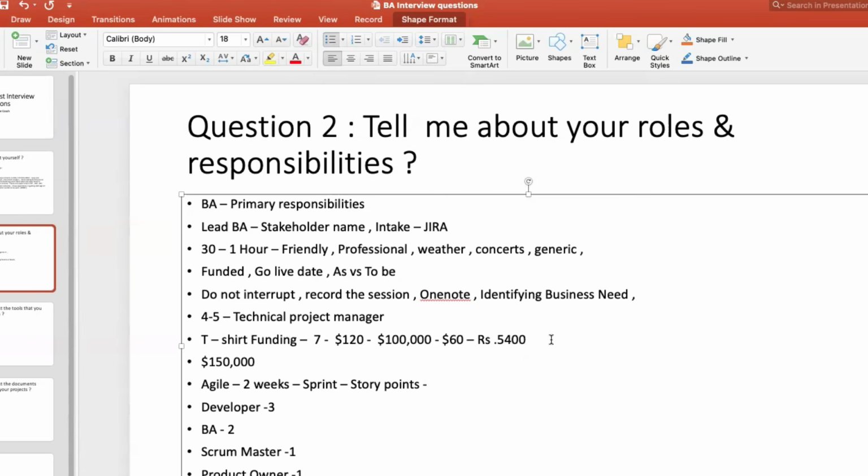it's not only your salary, but the building cost, your transportation, food cost. There is a lot of cost involved, insurance and extra and all that. So all that is there. And then they need to have a buffer for you, because this project is not a sure shot that it's going to end in 4 to 5 months. It can be extended to 6 to 7 months. We know additional billing may also be required, but this is how it is.